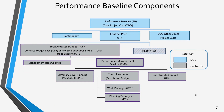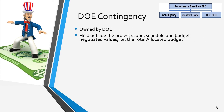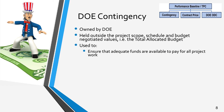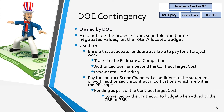This snippet does not focus on the components of the PMB, but the TAB is the level at which budget is managed by the contractor. We will start with an explanation of contingency, which is a cost reserve owned by the customer — in this case, the DOE. It is held outside the project scope, schedule, and budget that have already been provided to the contractor. On the Performance Baseline Components Chart, recall that contingency was shown above the total allocated budget. The contingency is the source for additional funding.